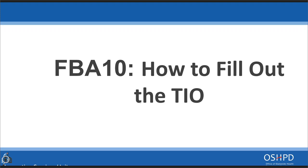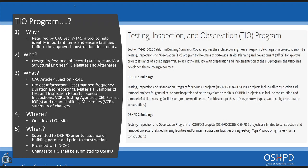So the TIO program — why do we need it? The TIO program is required by the California Administrative Code Section 7-1141. It's also a helpful tool to identify important items and ensure facilities are built to the approved construction documents. The design professional of record is responsible for the TIO; the architect and/or structural engineer delegates and alternates as well. Remember that the TIO is not the responsibility of the IOR, the special inspector, or the contractors on site.